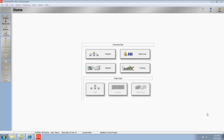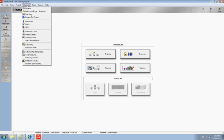Roles are considered enterprise data, which means that they can be used across all projects in your database. Since they're enterprise data, they are set up from the Enterprise menu in P6.